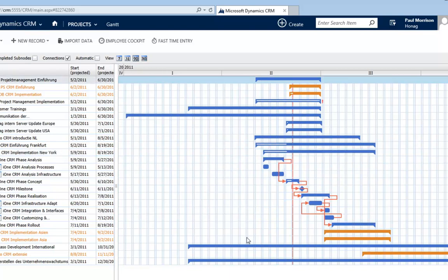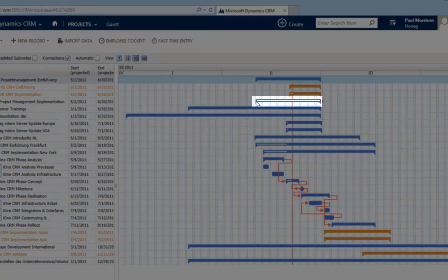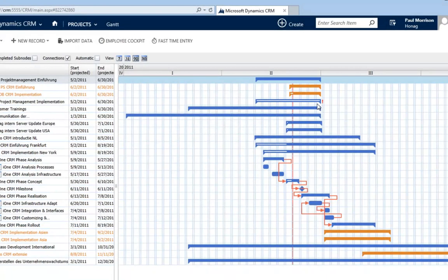If a project has exceeded its planned days, like all man days are entered against what's planned, you see this here, where the white bar is all over the whole bar, and we get an exclamation mark at the end of the bar.